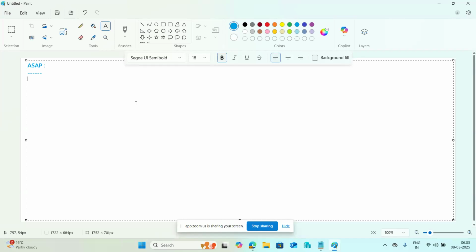As part of the SAP methodology phases, the first phase is called project preparation. In project preparation we do the initial planning, the scope of items, the project goals, and hiring and onboarding the team.